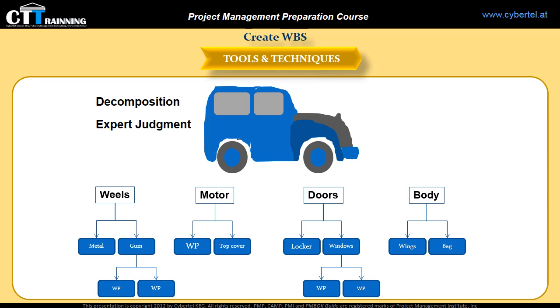How can I verify that my decomposition is appropriate enough? Then you have to determine that the lower level of the WBS components are necessary and sufficient for completing the corresponding higher level deliverables.